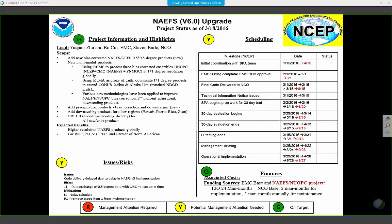We're doing V5. That's the briefing later today for V5, and this is already right on its heels? Yes. I thought we were going to do one a year. Well, the 5 is way delayed because of the gas delay, and so that means that the 5 and the 6 have come really close together, even bumping the 6 out a little bit, but we're not willing to bump it out to be another year.